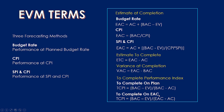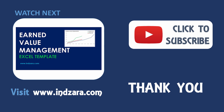A TCPI greater than 1 indicates it will be harder to achieve the target; a TCPI less than 1 indicates it will be easier. Now that we have covered all the terms used in earned value management, let's take a look at the Excel template which will help us calculate these metrics for a project.